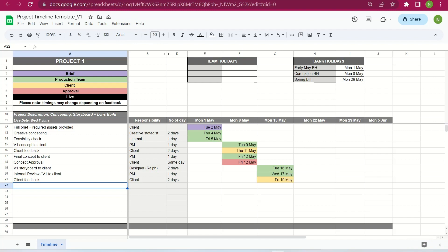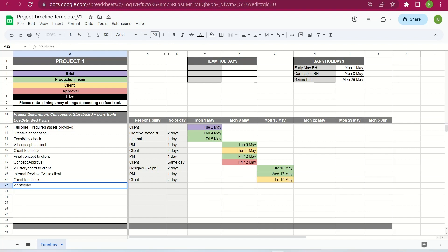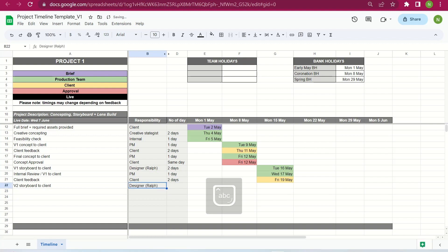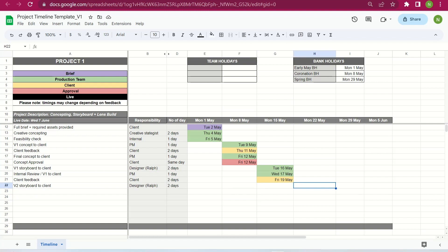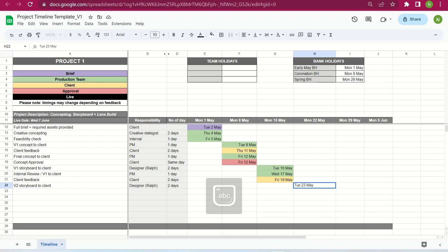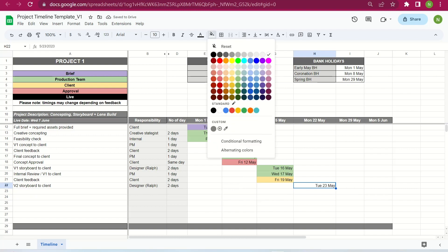Next is version two of the storyboard to the client. This goes back to our designer Ralph. We can give him two days — though if the timeline needs to be tighter because the client has a specific live date, you might have to give just one day for V2. In this case we've been fairly generous with two days each. That takes us to Monday the 22nd of May, and then we send it on Tuesday the 23rd of May.